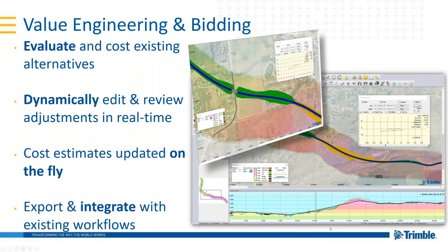From a value engineering and bidding perspective, you can bring in an existing alignment, drop it into the system, and it will cost it straight away — calculating templates, earthworks, and costs based on the alignment, then optimizing based on geometric and engineering criteria. You can also make very fine-tuning manual adjustments and see the cost impacts on the fly. Rather than waiting hours for answers, the system very quickly generates an optimal alignment and lets you manually adjust it as well.